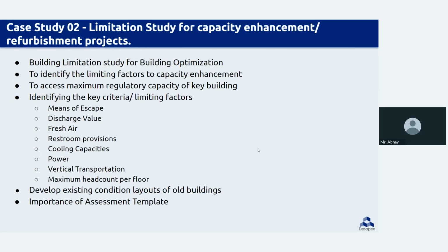The first step was to capture the existing condition, because most of my client's buildings were 20-plus years old. Either the drawings were dilapidated or they were missing. Also, my client had made many minor modifications to the interior layouts in the last 20 years, through small contracts, and they were not reflected back in the main drawings.